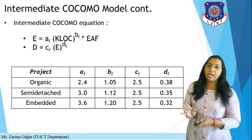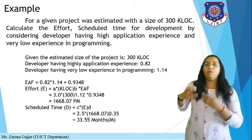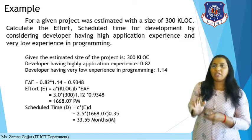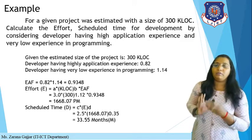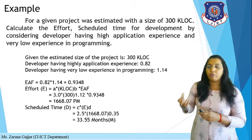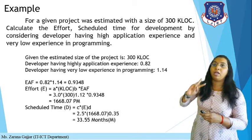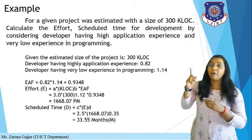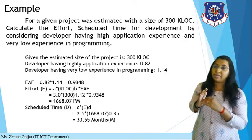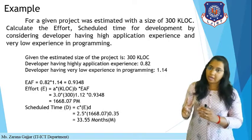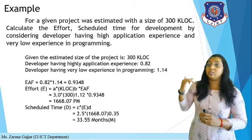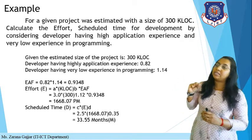Let's understand with a proper example. For a given project estimated with a size of 300K LOC, we need to calculate the effort and development time. The developer has very high application experience and very low programming language experience. From the parameter table, we take A_EXP (application experience) = 0.82 for very high, and L_EXP (language experience) = 1.14 for very low.